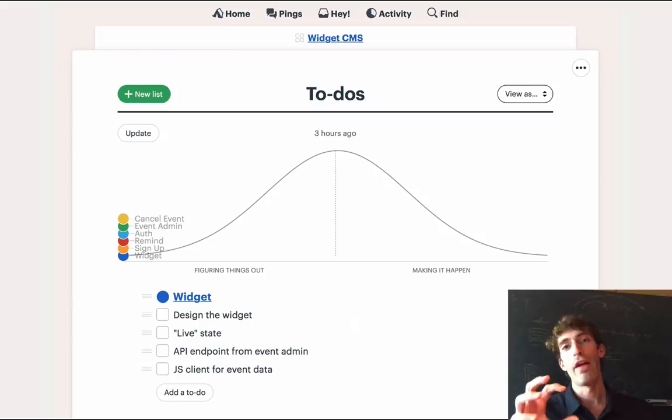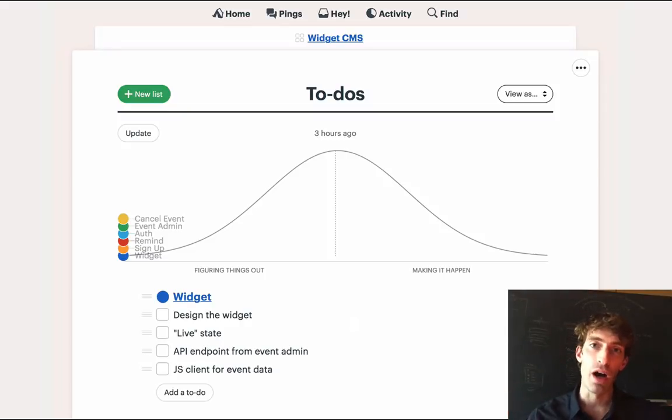That's because if we collect all the work that has to happen for this one scope on the same list, then we can track this one independent piece of the project from unknown to known and known to done. And it's going to really mean something. It doesn't just mean that one little piece of the work is done. It means this whole piece is something that we can knock out and finish.